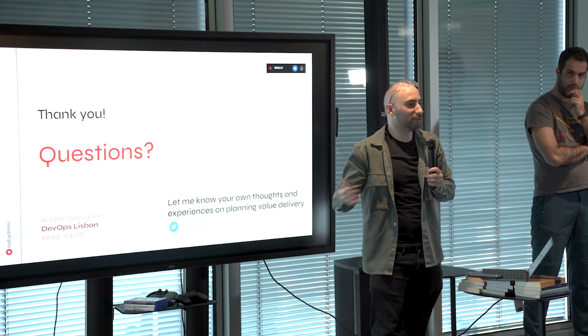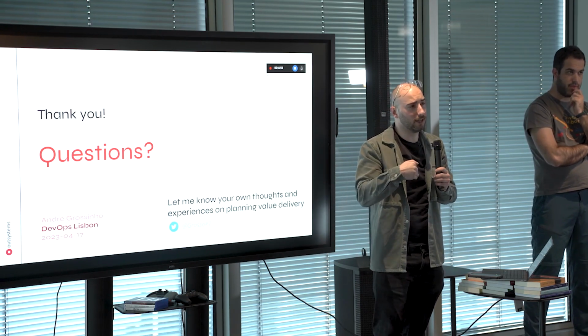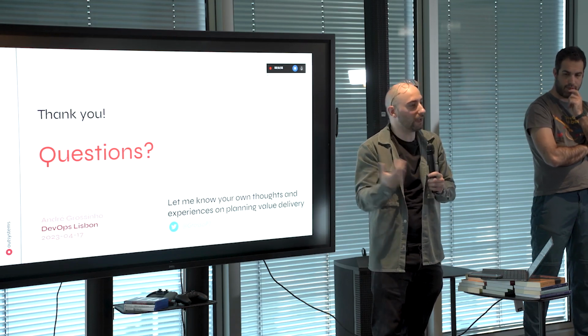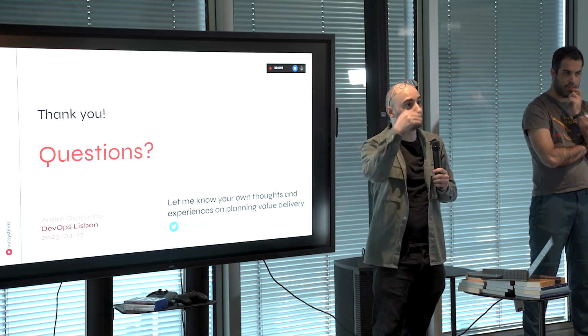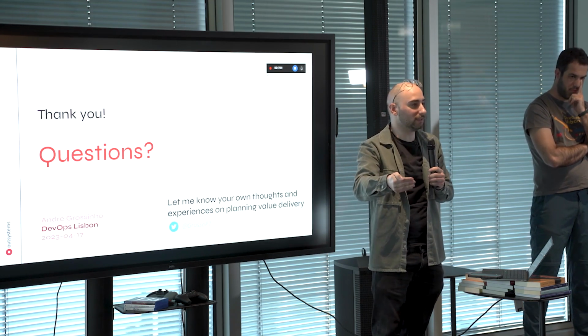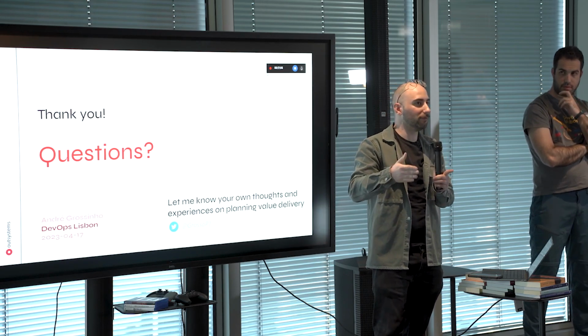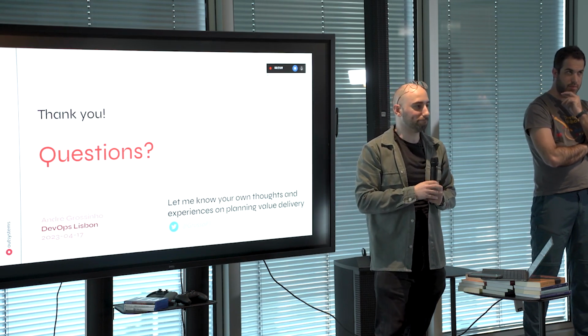But what I found is most often we are working on internal assets. They are not the priority a lot of times. So we need to take care of that. And this helps with that, to prioritize. What we usually do is we try to go for the dependencies as soon as possible, and then balance the platform, future platform work, and the technical debt.